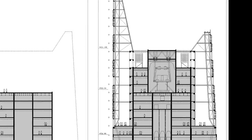So in the last year of construction, a lot of simultaneous things have to happen, and it's usually at the top of the building and the bottom of the building. At the top of the building, we have to put in the TMD, the tuned mass damper, which is a big weight that actually allows the building to resist high winds in terms of comfort. It's a big weight that moves out of phase with the building to make it feel more comfortable. This is also an amenity to the building where we'll sell tickets to actually see this large weight. The trouble is, only in high winds will you see the weight moving. So when you go see this apparatus, you probably won't see it moving.